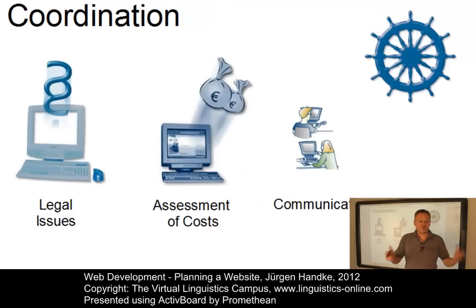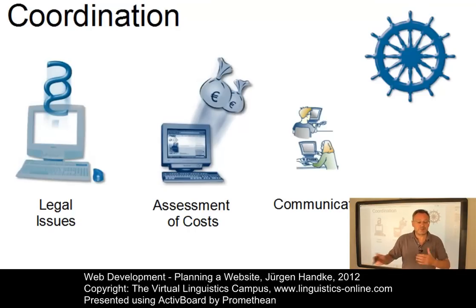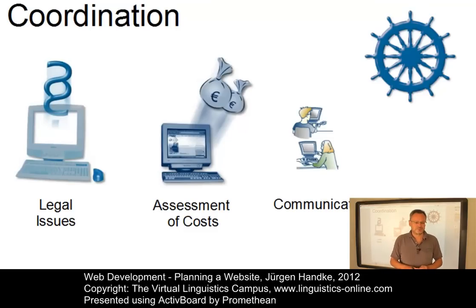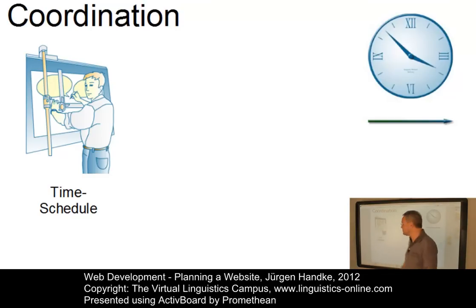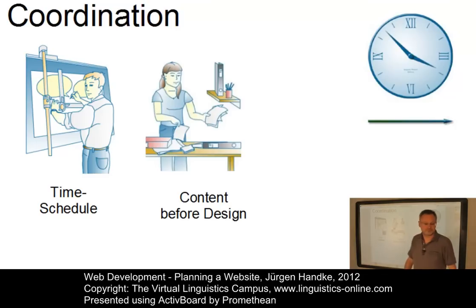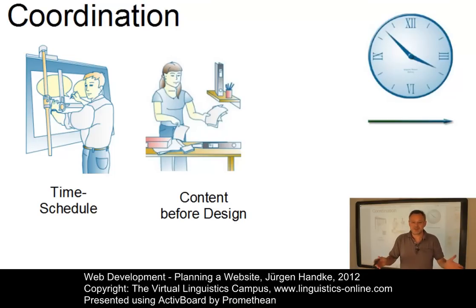Coordinating a website team is very important, but at the same time it is extremely difficult. Legal issues, cost management, and communication with and among team members belong to the central issues of team and project coordination. Furthermore, the project manager will have to put up a detailed schedule of whose turn it is in the process of site development. Sometimes the order of events in such a schedule is pretty clear — for example, due to the fact that a graphic designer cannot illustrate content that has not yet been written.